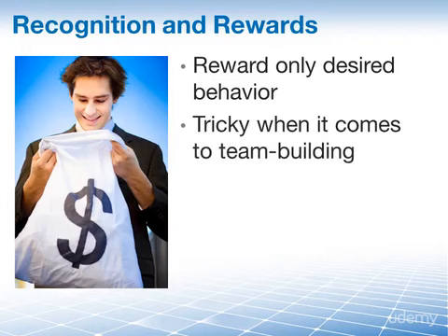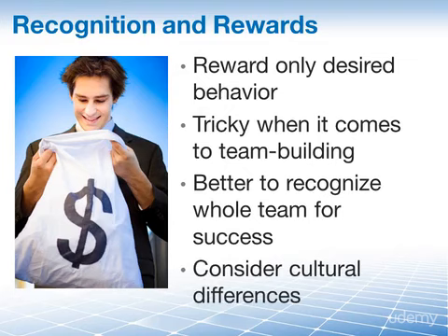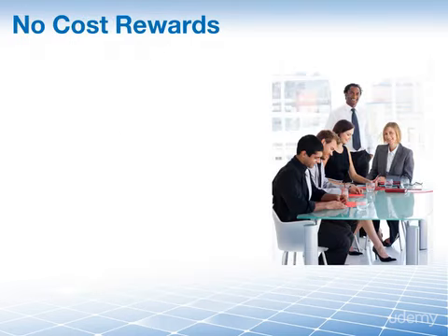Rewards are also tricky when it comes to team building. For instance, naming someone the project team member of the month means that he is the winner this month and everyone else loses. This may not be good for team morale. Similarly, in Asian cultures where the group is more important than the individual, it's better to recognize the whole team for a success, even if it was dependent on just one person. And because of that, we have just learned that the cultural differences must be taken into consideration when you look at recognition and rewards.